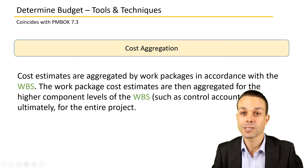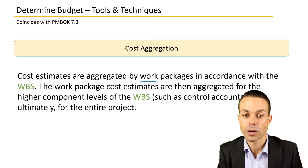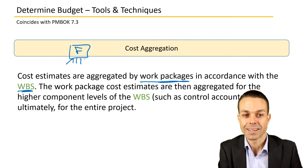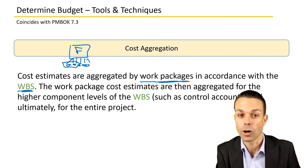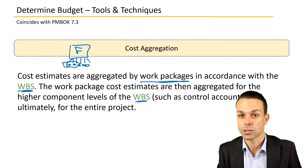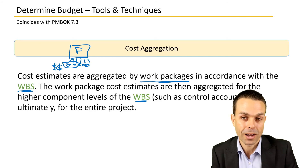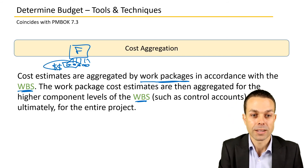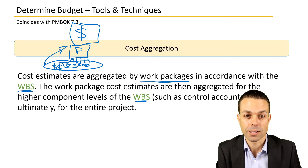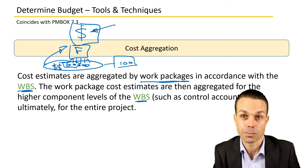Cost aggregation is also a tool and technique. Cost estimates are aggregated by work packages in accordance with the work breakdown structure. We break high-level features down into smaller work packages that a team can work on, and the experts doing the work estimate how much each package will cost. All of these estimates are aggregated up to the higher component levels of the WBS, such as control accounts, resulting in one overall figure that becomes a key part of the budget.